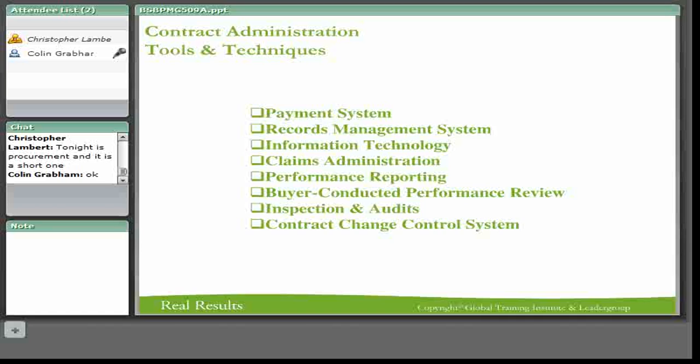Now that's really quite important to look out for. Those are all the transactions that take place. Let's look at them. It's the timesheets. It's the material, the delivery notes for materials. All of that paperwork needs to be managed exceptionally well, because that's where the errors come in. When delivery notes go missing and 30 cubic meters of sand comes in there, and you can't justify why it's there, and it's just been sitting there. Nobody's used it. That's where the errors come in.